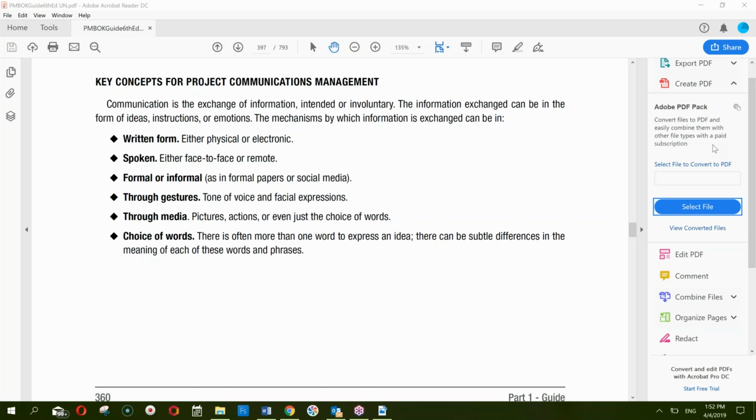But why do we need to understand how many channels can be opened at the maximum? Because during the project, certain situations might arise which would dictate that a special channel be invoked, which was otherwise not planned. So I should know that this is a valid channel, this is a stakeholder, these are the existing stakeholders. We cannot communicate with a non-stakeholder. You understand that point? Only the stakeholders will talk to stakeholders.